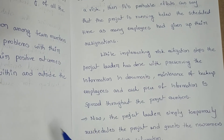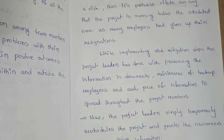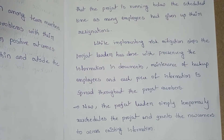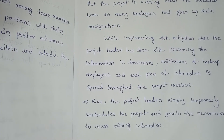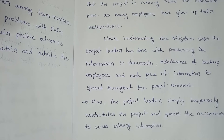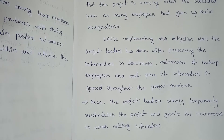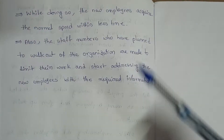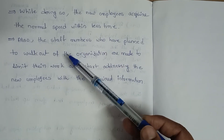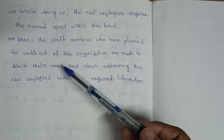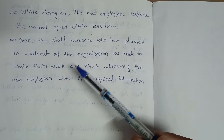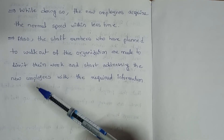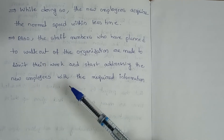Now the project leader simply temporarily reschedules the project and grants the newcomers access to existing information. In simple terms, if the project leader maintained proper risk mitigation steps at an early stage, the project can continue smoothly. The new employees acquire the normal speed within less time, and the staff members who planned to leave the organization are made to limit their work and start addressing the new employees with the required information.